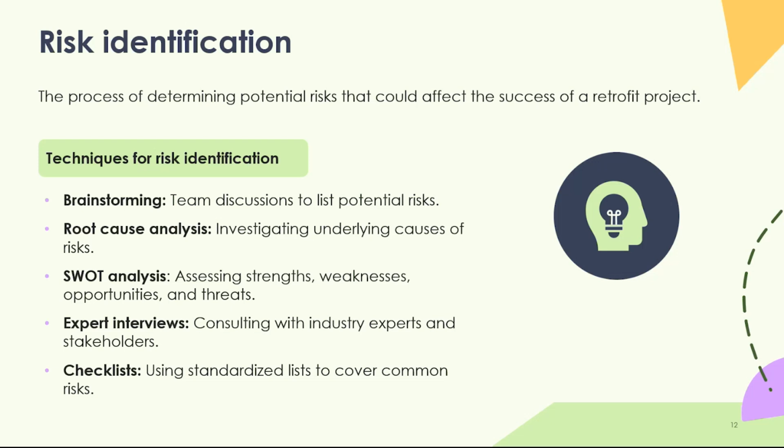Root cause analysis is particularly worth doing where you've had problems before or complaints come up. Investigate why those things have come up previously, and therefore whether they're likely to come up again in this project.